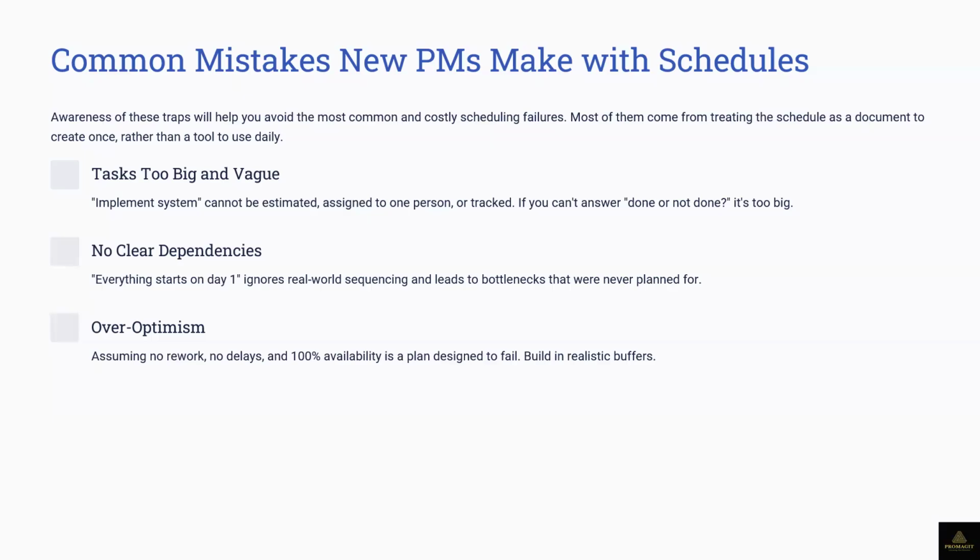Then you are going to do that project for 10 months plus 1.5 years, which is about 2 years and 4 months. And the client might not agree to that. They will tell you secretly, no, you don't have to do this. They look at your schedule and ask why you can't just start this activity at the same time, since this one does not have to finish before you start that. So that's why I say you have to be very smart. When you build your schedule that way, we can run them in parallel, which automatically reduces your schedule to 1.5 years instead of 2 years and 4 months.